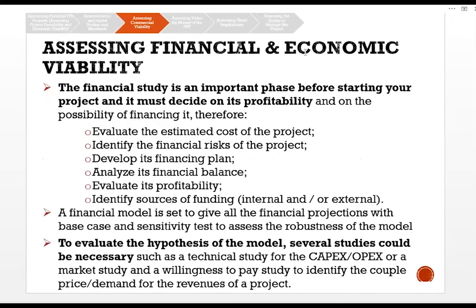Assessing financial and economic viability: the financial study is an important step before starting a project, and it must assess profitability and the possibility of financing. Therefore, it is necessary to evaluate the estimated cost of the project, identify the financial needs of the project, develop its financing plan, analyze financial balance, evaluate profitability, and identify sources of funding — both internal and external. A financial model is set up to give all the financial projections with both base cases and sensitivity tests to assess the robustness of the model.